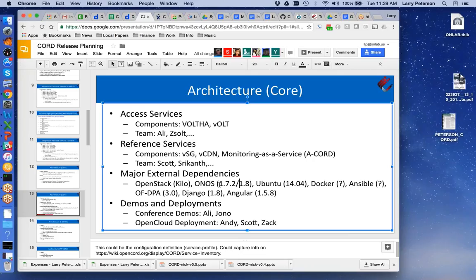I think we can make an exception here or move to 1.8, but this shows a different problem, right? The issue is that we have the Fabric subsystem that's inside ONOS, therefore following the master branch of ONOS, and therefore any changes you need to make to upgrade the Fabric, you're making in the master branch, which goes to the next version of ONOS, which is not in sync with CORD.